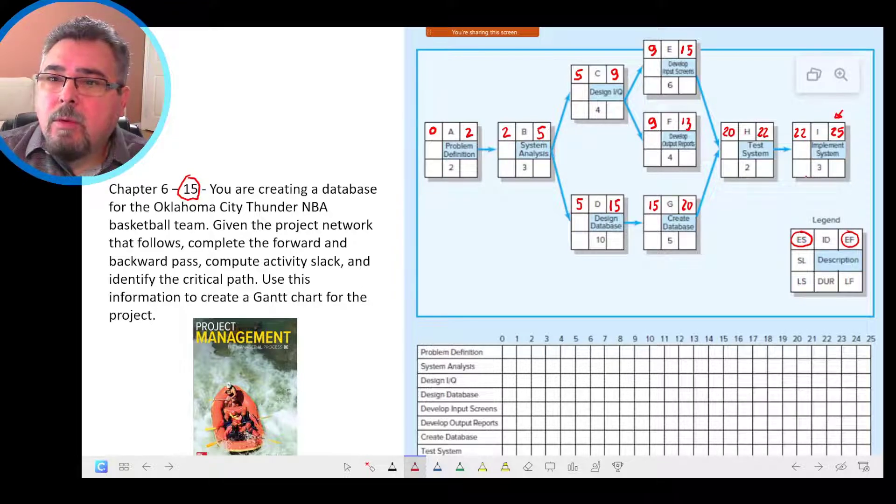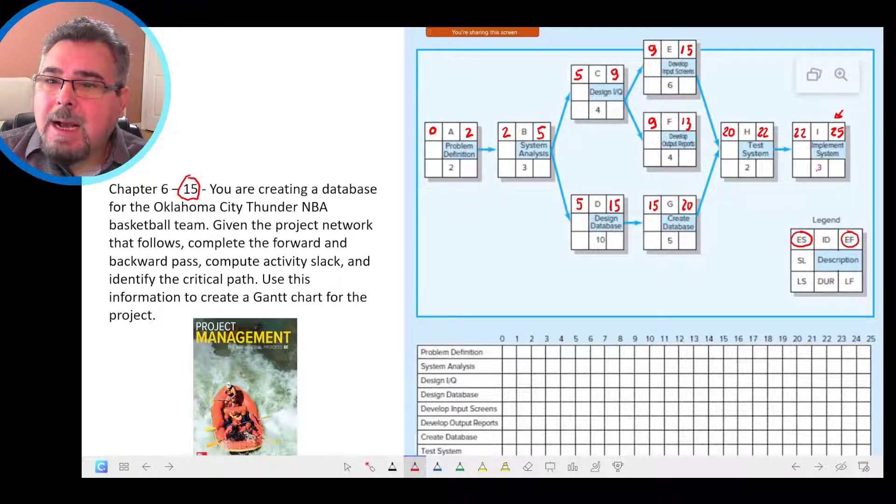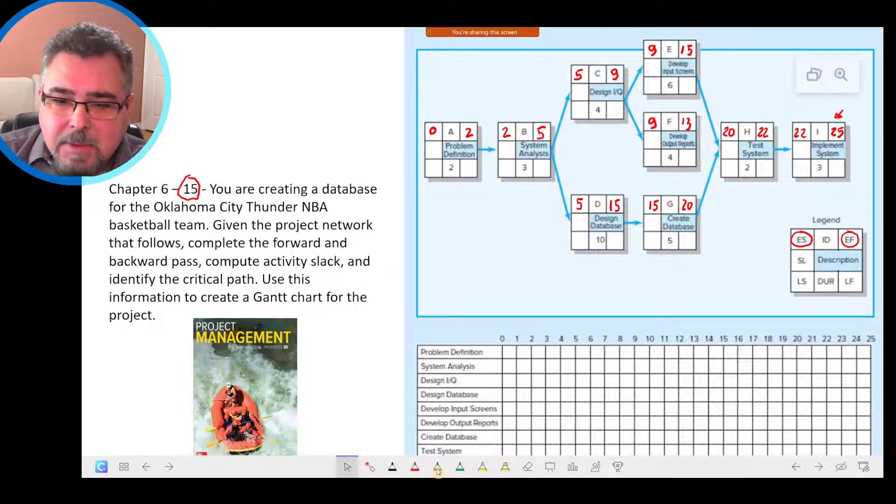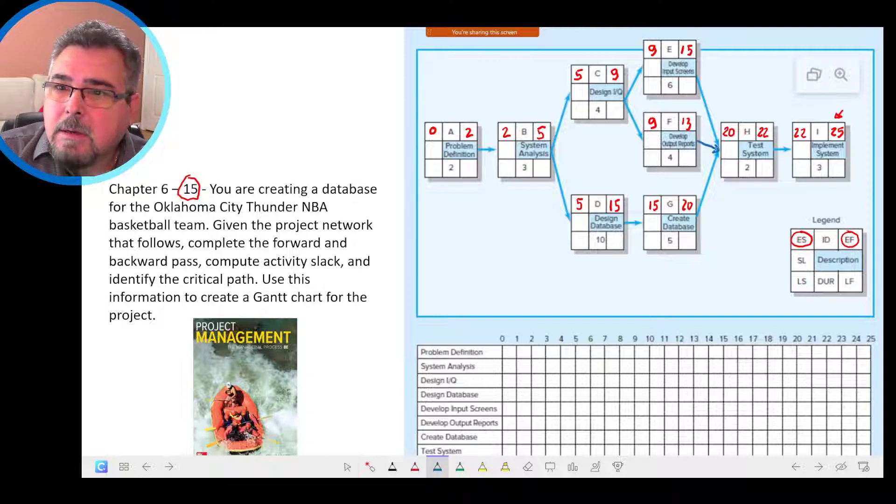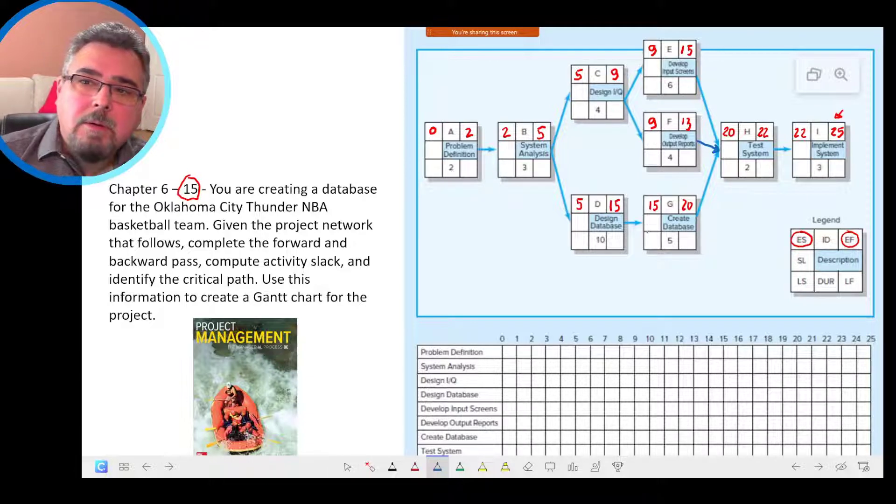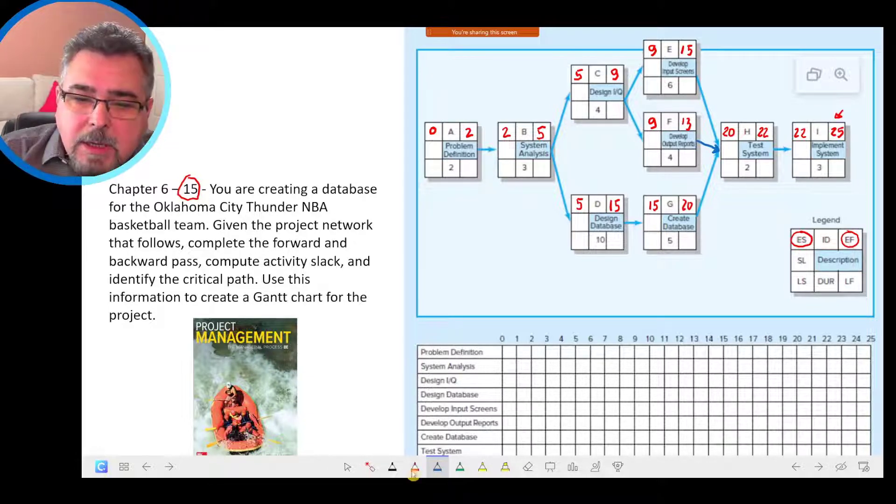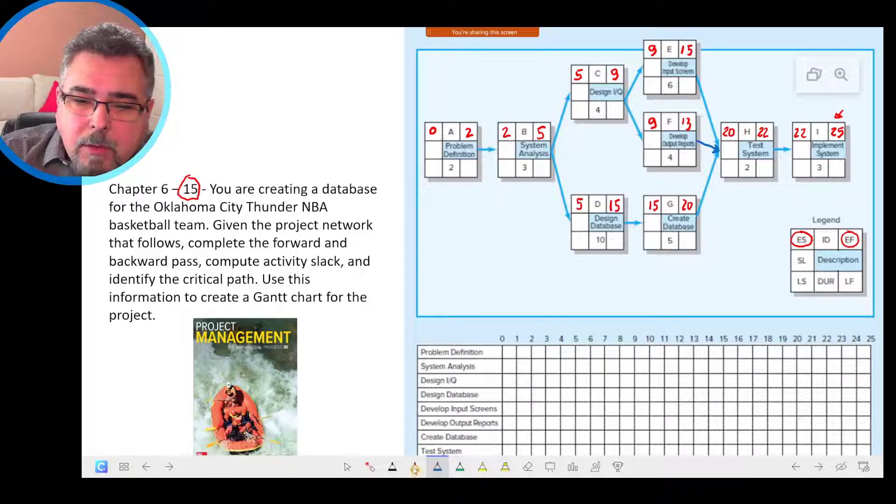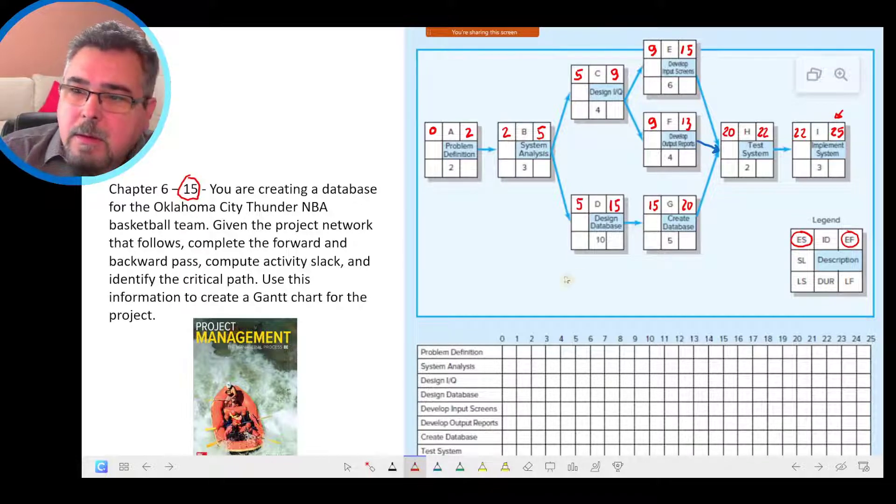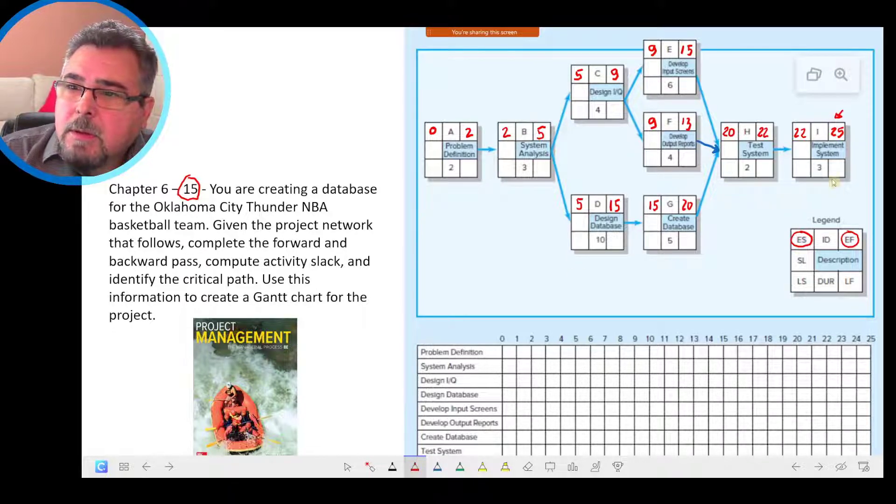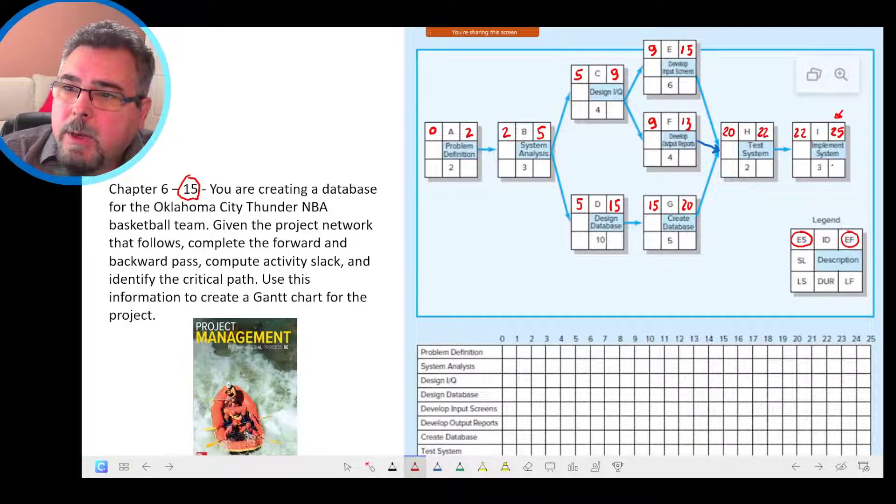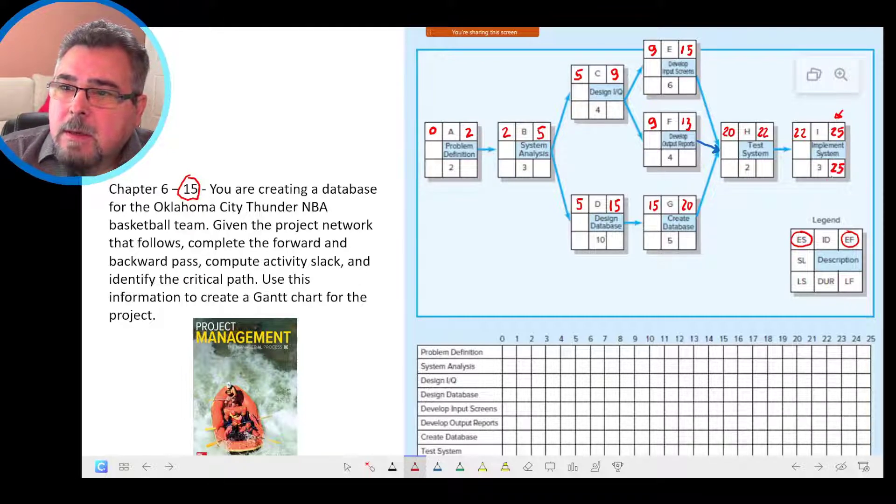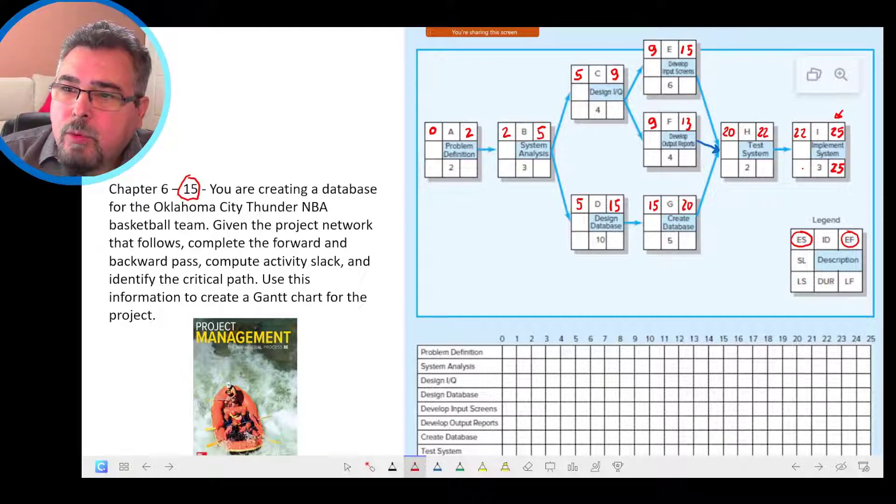Now, we move back. I guess there is something missing here, arrow here as well. Let's consider that there is an arrow in that direction. Let's do the backward path. We start in the back with 25, and we start subtracting moving backward.